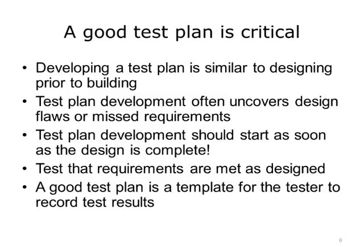One of the most important steps in testing is to plan the test. The test plan development work can begin as soon as the design is done. The design document is a helpful basis for the test plan. Sometimes creating the test plan will actually uncover flaws before any testing has occurred. The goal of the test plan is to fully test that requirements are met as designed. Sometimes people are tempted to do unplanned experimentation with the system and call that testing. That technique is useful, but is not a replacement for a thorough planned test process.